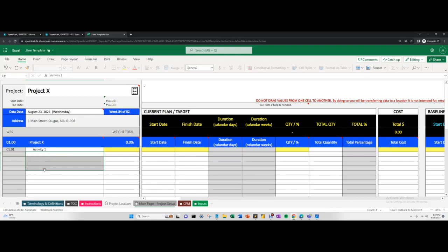So if you have a different WBS and you don't want to follow this, then the recommendation is that you correlate that in a separate file so that you know that your WBS means this activity. Because obviously everybody has a different WBS for their company, and there's no way that you can have it consistent with every single company for every single person, right? Or project, for that matter.